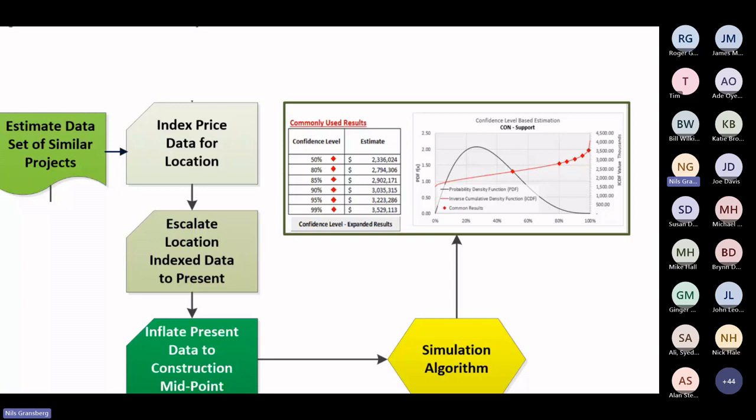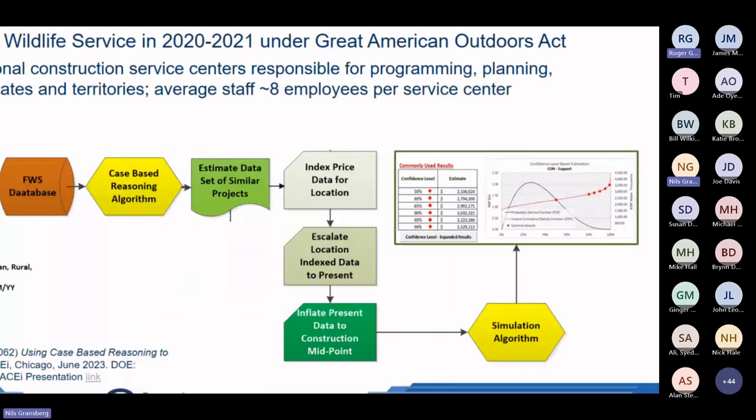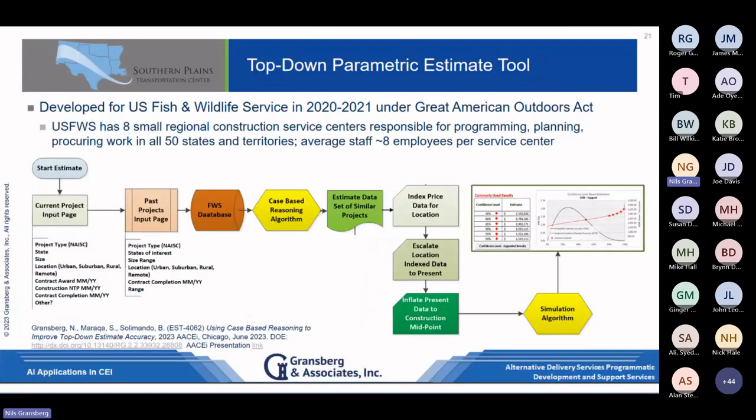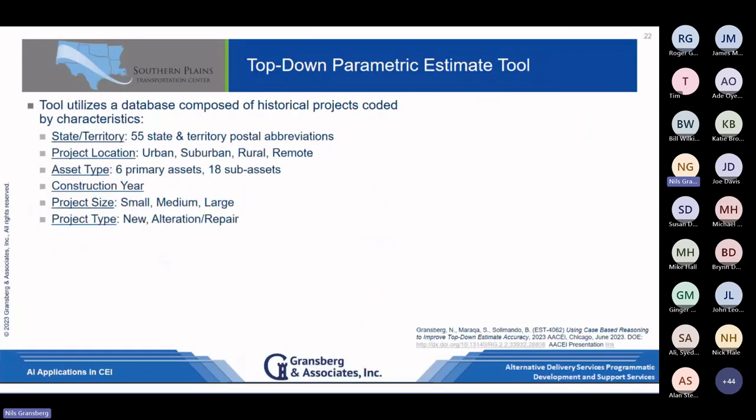And really, the way you interpret these is this 50% is the mean value, the average. Whatever it costs beyond that, above that, is my contingency, right? So if I'm afraid that it's going to cost more, maybe I choose my P80, and now I've got $2.7 or $2.8 million in there, which means $500,000 is contingency essentially. What that does is let you have some confidence and accelerate the whole process. So this is kind of how this tool works.